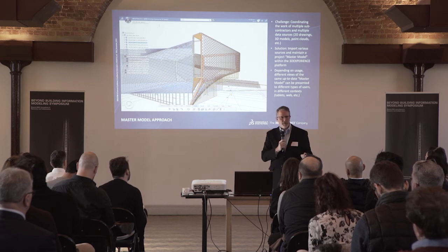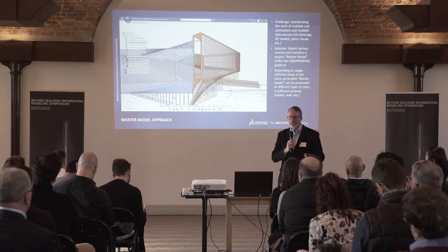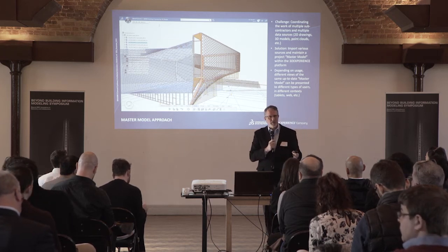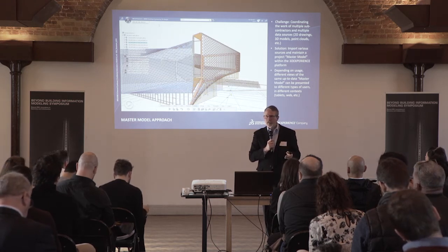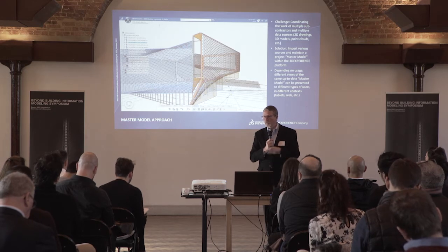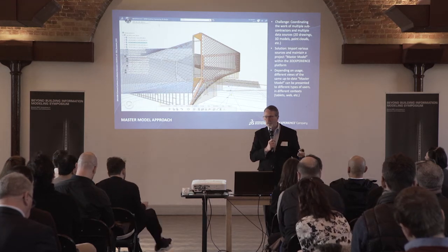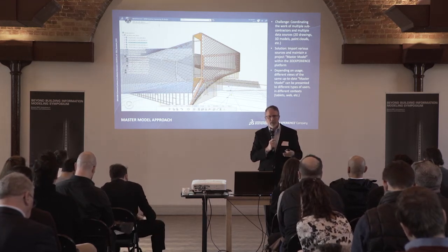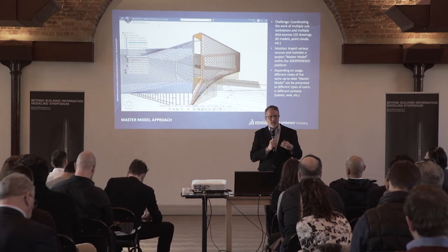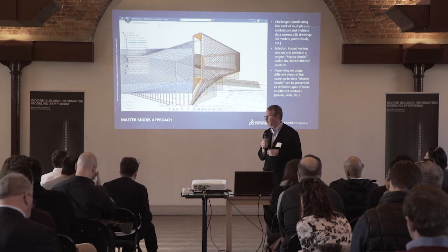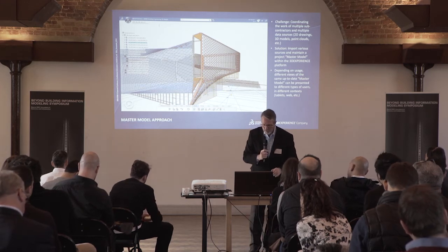Do we do off-site construction? Is it off-site in a factory, or is it near the construction site in a warehouse? Is it chunked out into these pieces? Do we prefab elements? How do we execute? The how question can impact the cost of the building by a quarter of the total budget. The what questions that we ask get value engineered out at some point, and we're having really the wrong discussions. We could get a lot more for our service if we showed the impact we could have on how the building's delivered and the impact we can have on overall cost. Let me go to a video for that as well.